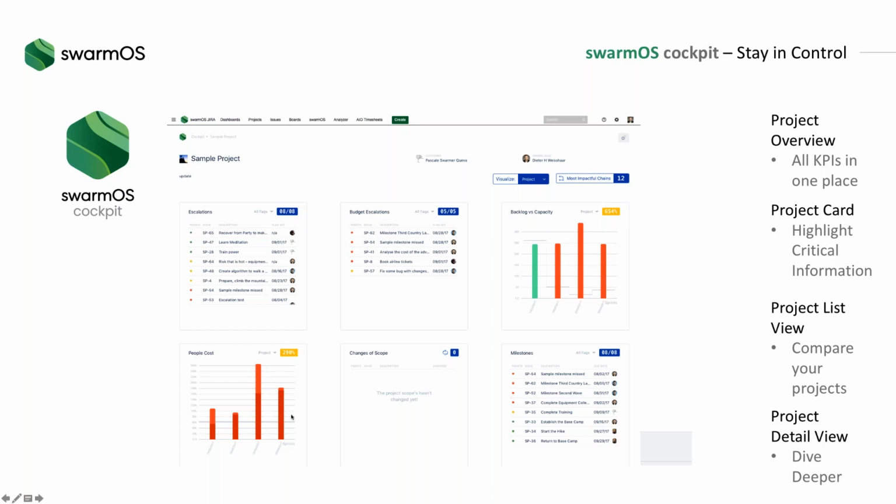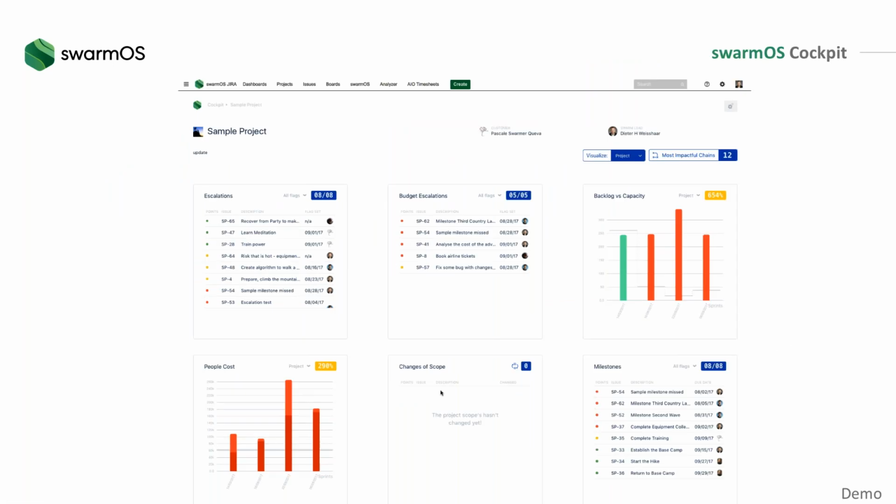As promised, we would measure sprint by sprint the cost which has been incurred up to now and the cost which is estimated to complete the project for the project timeline or release date of a certain sprint. You would see all of the milestones or versions which have been achieved, which have failed to be achieved on time. You would see change of scopes. There's nothing here, but there is a very good deep dive which we can show in the demonstration in a minute.